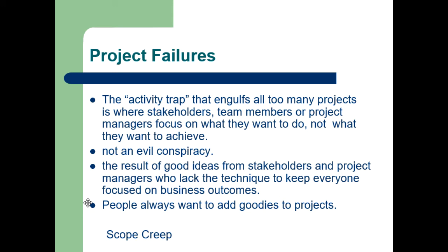Again, you need some kind of change control process where not just anybody can change the scope of things you're working on. There has to be a review process, and you have to take the impact into everything, not just the scope, but the cost and the schedule into consideration. Because if you're going to do more work, it's only fair to pony up more money for the project, and maybe management doesn't want to do that. So you need to think very carefully about that.